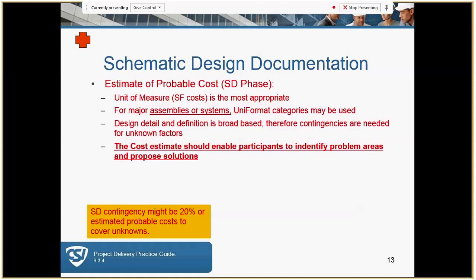Probable cost at this stage — we're going to look at what unit of measure is most appropriate, and in this case it will be square footage cost. The other consideration in terms of cost is assemblies and systems, and again UNIFORMAT. The types of questions you get will say you're in such-and-such a phase of the project — which would be more appropriate, an outline spec or UNIFORMAT? The cost estimate should enable participants to identify problem areas and proposed solutions, and there's a higher contingency at this point — we're still early in the game, so it might be twenty percent.